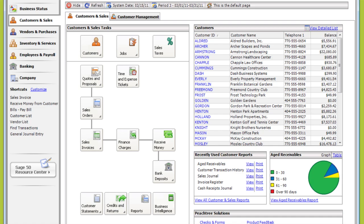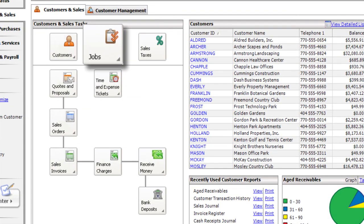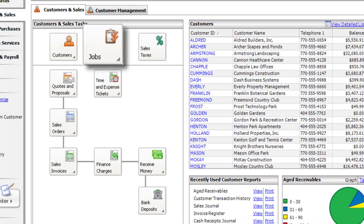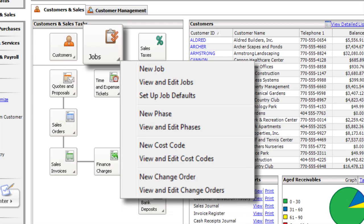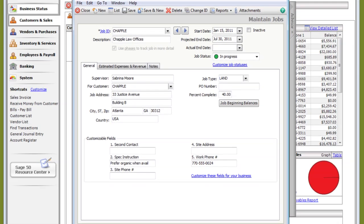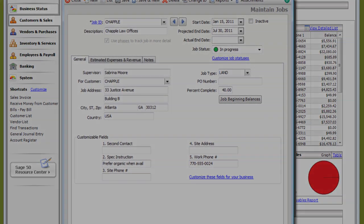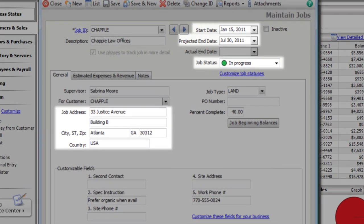You can monitor your jobs and projects using job records, where you can track as many details as you want. If the job is small or doesn't have many cost components, enter a single job record. You can enter the important details like location, start and projected end dates, and job statuses.